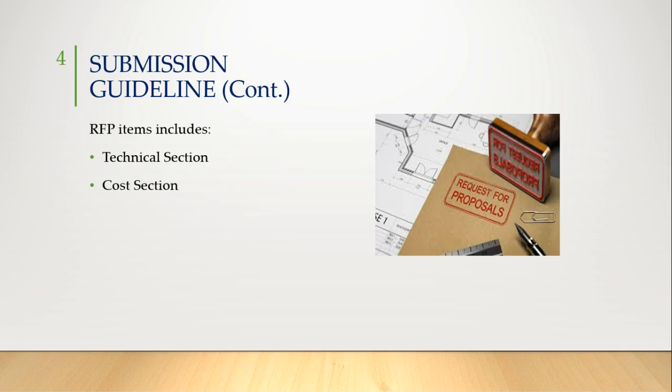The next section is cost. The pricing section gives the supplier a format to follow when pricing the proposals. In this section, the supplier shall provide all the information related to cost in an Excel and a Microsoft Project file. Furthermore, it is fundamental to include a section dedicated to the types of contract along with agreements, performance bonds, and warranty periods.